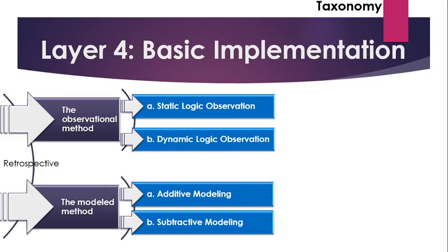Layer 4: Basic implementation. The fourth layer consists of the differences in implementing the methods. The static logic method can be implemented in a gross or periodic mode. The gross mode considers the entire project duration as one whole analysis period without any segmentation.